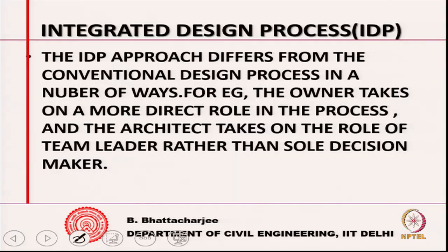Then integrated design approach, right. So, this differs from the conventional design process in a number of ways. For example, the owner takes on a more direct role in the process and the architect takes on the role of team leader rather than sole decision maker.